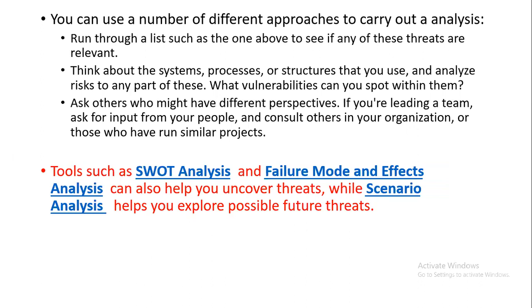So to do the analysis, we have tools such as SWOT analysis and failure mode and effects analysis. They are going to help to uncover the threats. That means we can see what threats we are having. And then we have another type, that is scenario analysis. It is going to explore the possible future threats.